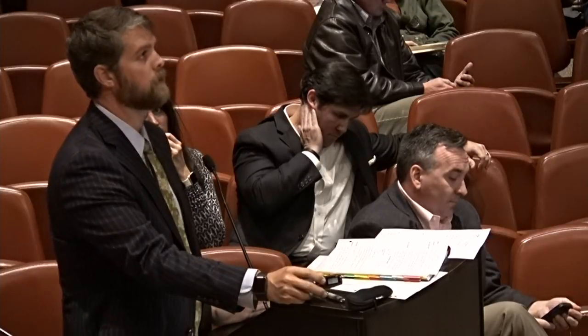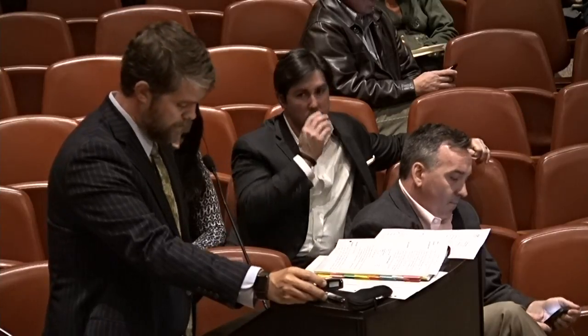This project, and if you want elaboration on this brief statement that I'm about to give, I'm sure the applicant can do that, but this project will be bid out as both a school project with an alternative to include the central office area. So it's our recommendation to have this considered by the Planning Commission as a two-phase development in the case that those bids don't come back in something that the school district wants to proceed with immediately, and we discussed that at the executive session.